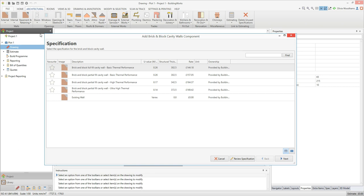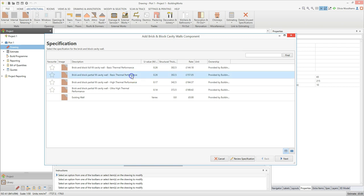Start by selecting a wall specification which suits your job. A choice of specifications with different U-values, structural thicknesses and rates are available out of the box. Each specification includes real materials and manufactured product data. Click on the wall specification you want to use. If you need to, you can tailor a specification by clicking on it and then clicking the review specification button.